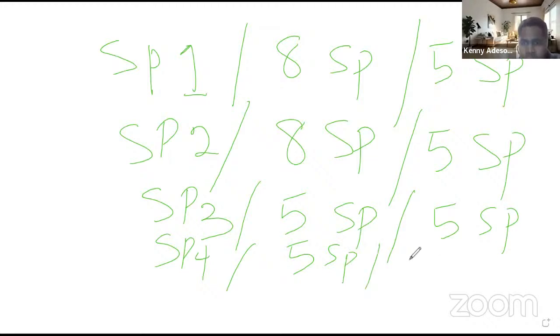And why is that the case? Because when we find the average of 1, 2, 3, it is 5. So when you get to sprint 4, it's common sense to put 5 into sprint 4. We must make sure you accomplish that. So these 5 story points become our velocity. So going forward, if the team is consistent, if the team is in the office, everybody's working at 100%, we can't do more than 5 story points going to any sprint where we're all in the office. That's what's called the velocity. Is that clear, guys? Are we clear on the velocity? Yes.